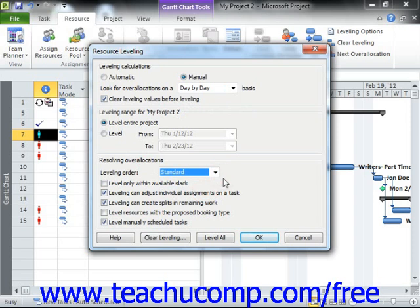Next, if you want to allow the leveling to only use the available free slack within the project file, then select the Level Only Within Available Slack checkbox. This choice is most often unchecked in order to allow Microsoft Project to extend the finish date of the project file to resolve over-allocations, as there is often not enough free slack to resolve over-allocated resources without extending the finish date.